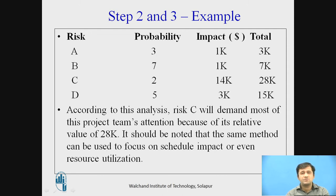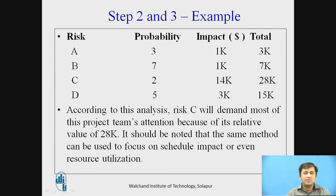Now, the same table is there as we have spoken — again risks A, B, C, D. But in practical cases, these are not only four types of risk. We are jotting down more than 40 or 50, depending on the size of the project. The project is broken down and in each division the risk is analyzed. In one project, the production team handles production risks, the materials team handles material risks, the maintenance team handles maintenance risks, and the overseas team handles overseas risks. N number of risks are calculated in brainstorming sessions during the big kickoff.